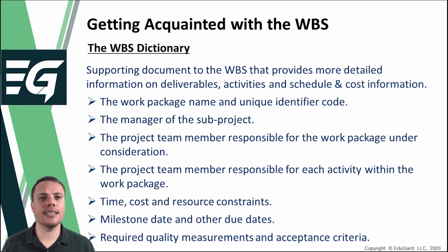Seeing as the resources and the estimated engagement time are reflected in the WBS dictionary, it may be worthwhile to get the project manager as well as the affected functional managers to co-sign the WBS dictionary. This is especially important in purely functional organizational structures where the functional managers are committing their departmental resources to projects and they remain responsible for the time and workload management of those individuals.